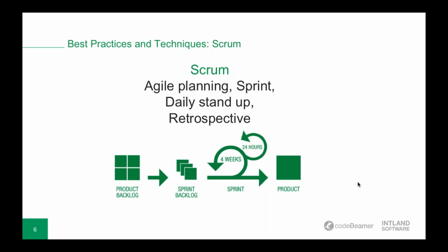So elements like agile planning, sprints, and daily stand-up and retrospective meetings are also needed, where the Scrum Master, as the product owner, leads these meetings. Scrum is set out in short time boxes and is driven by sprints. What you see here, they're usually 2 to 4 weeks, and Scrum provides a structure that allows teams to deal with the difficulty of collaboration and information loss.